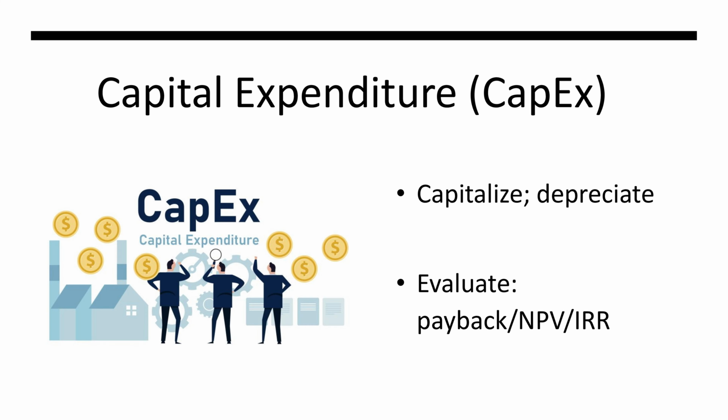And now we are taking a look at capital and project expenditure. When we invest in long-term assets, like a new CNC machine or an expansion, I treat it as capital expenditure. It does not hit the income statement all at once. Instead, it is capitalized and depreciated over its useful life. Before I approve or recommend CapEx, I consider payback, NPV, risk, and the impact on throughput, quality, and safety. I also plan for commissioning time, training, and initial spares so that the asset delivers value faster.